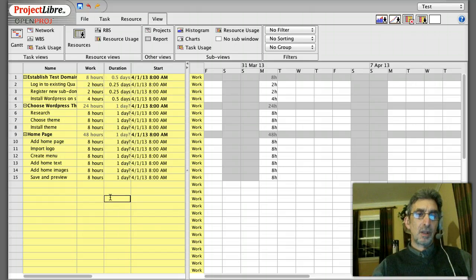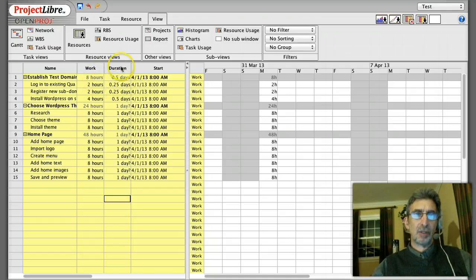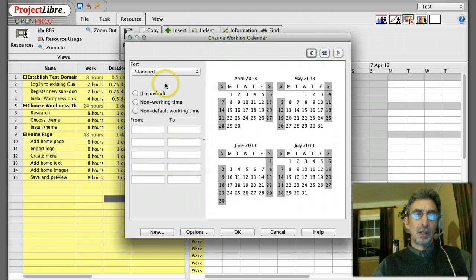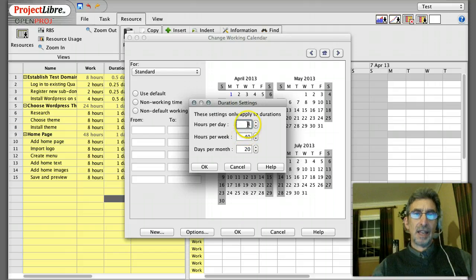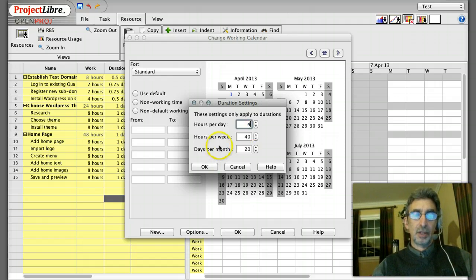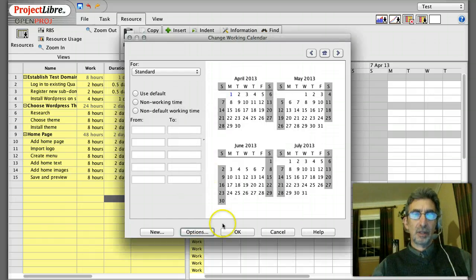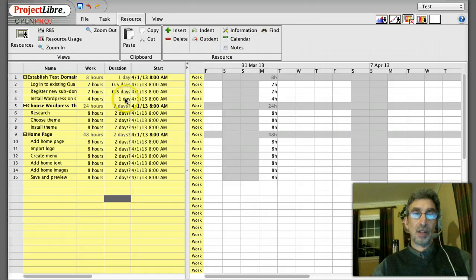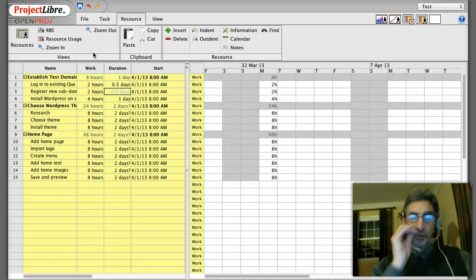So where does that eight-hour day assumption come from? If I go to Calendar under Resource and look at Options, it says 'hours per day: eight.' This is the amount of hours per day available to the project. If I change it to four, then two hours becomes half a day, and four hours becomes one full day. So this shows your duration on a calendar — what it would take if you spent exactly that many hours per day on the project.